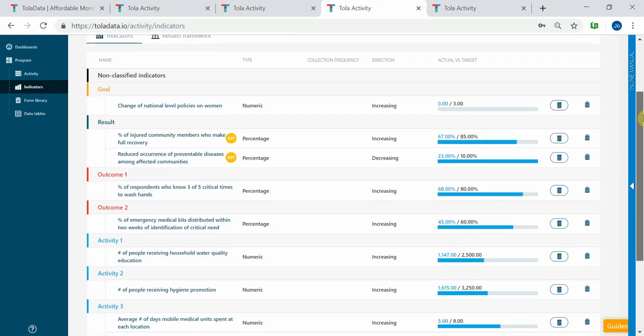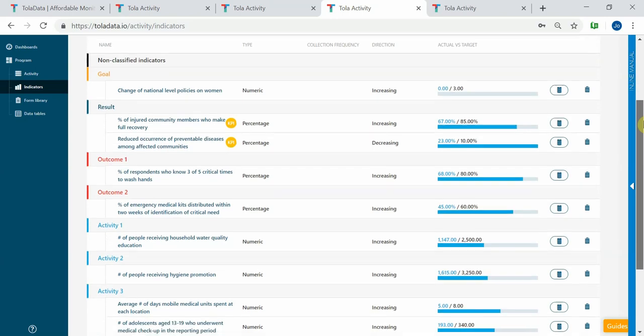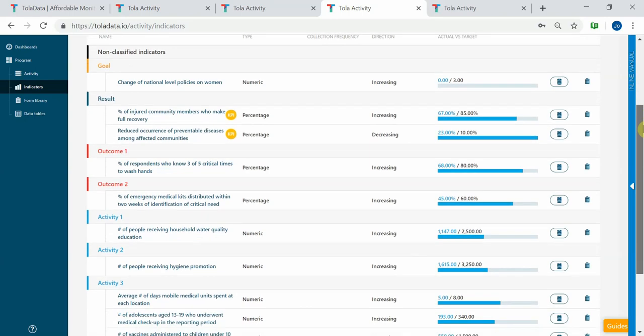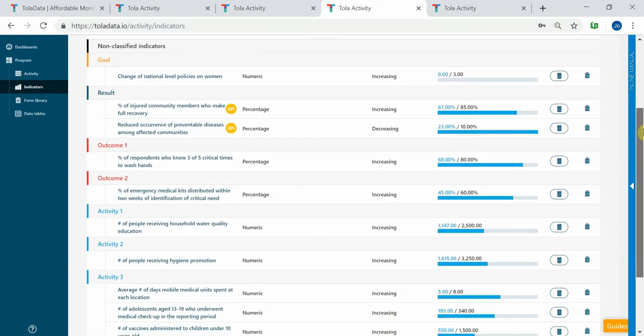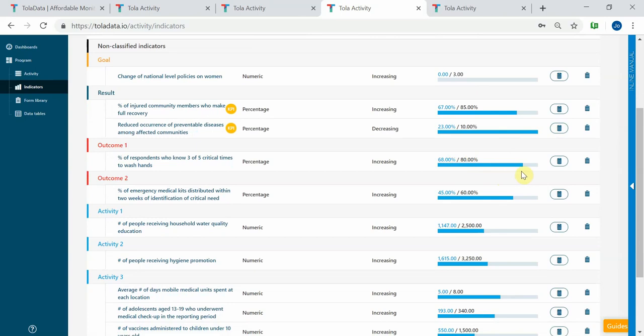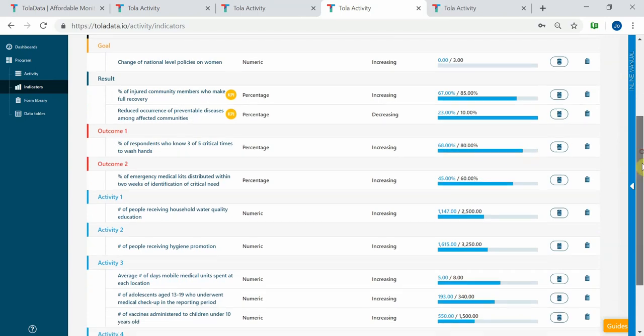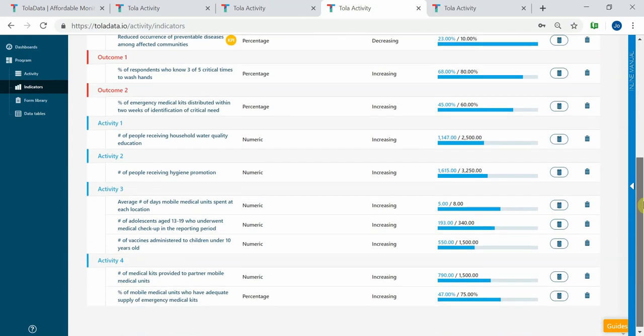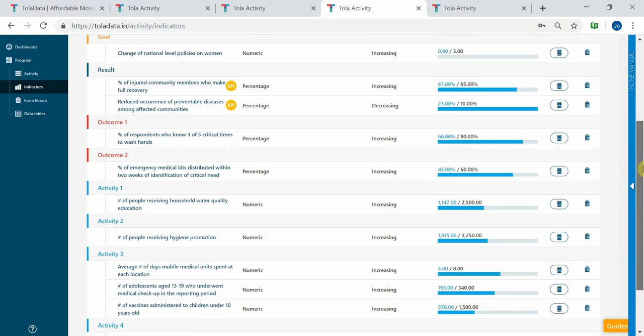As an M&E manager or project manager, you can come back to your indicator plan day to day and see where your results are to date and if you're on track to achieve your targets, with the blue bars showing how close you are to fully achieved on your life of program targets for your project.